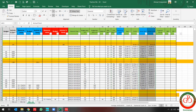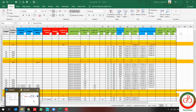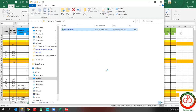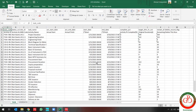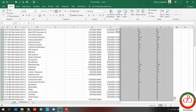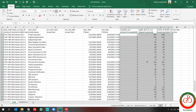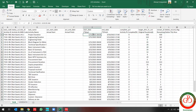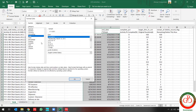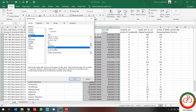In order to start the update, I need to open the file. When you want to use update by a spreadsheet, you should convert some text values to numbers, and then change the format of dates to the format I use exactly in Primavera P6.